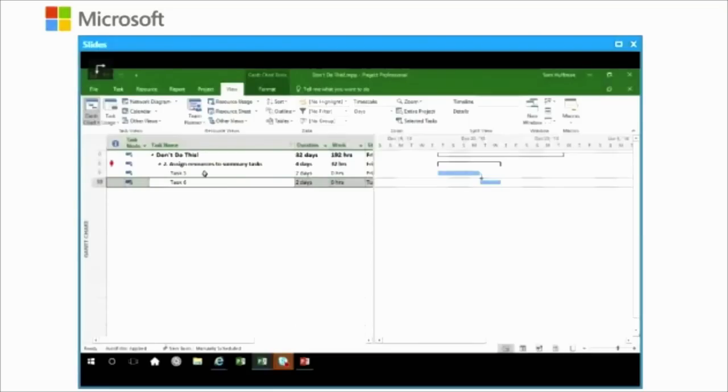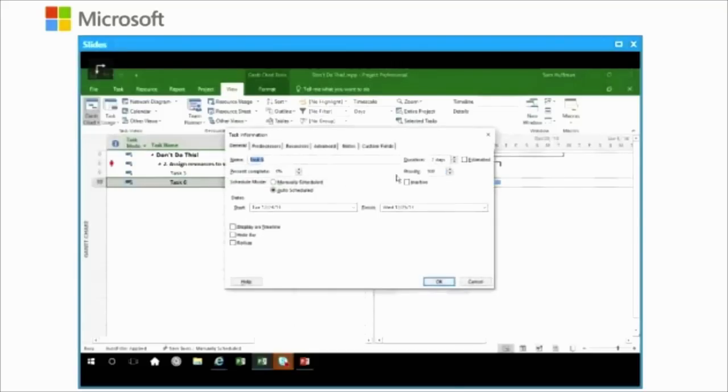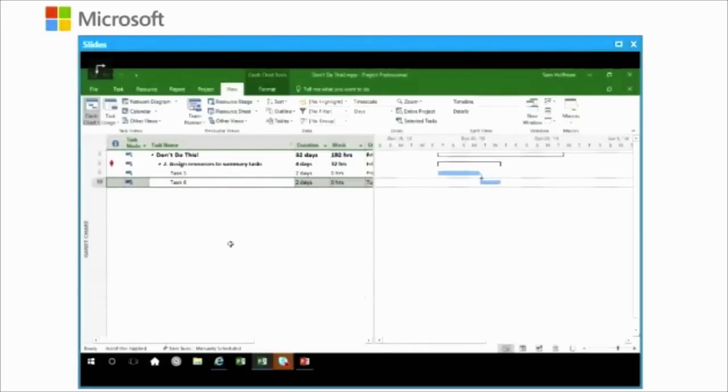In that case, a resource assigned to a task in a task list in SharePoint can synchronize with their Outlook. Now, it's not fancy. It's like a control that says, in Outlook, I'm going to tell my manager that I'm done with this activity, and synchronization will occur with SharePoint and Outlook. So again, it's not fancy. Your best bet here is going to be in project to have the resource calendar exclude those dates as working days so that no accidental assignment occurs.